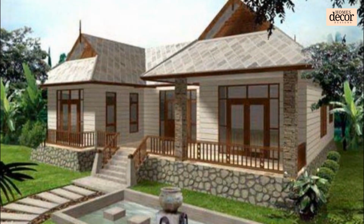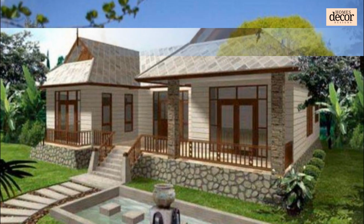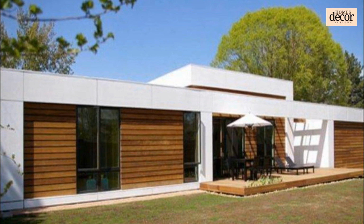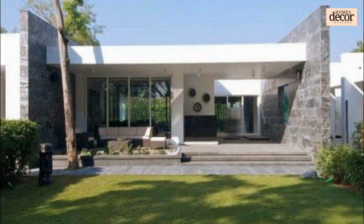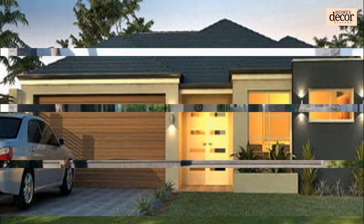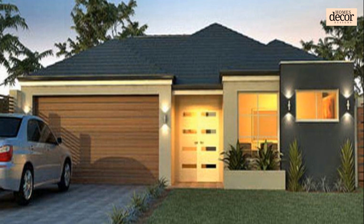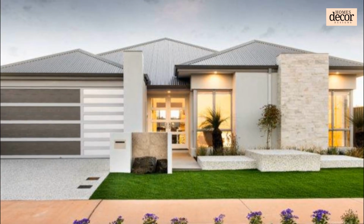Some people find it helpful to hire an architect or general contractor early on in the process in order to help flesh out ideas. With their expertise, small details won't be missed, such as how the addition will affect the lighting in the current space. If windows are taken out, how will natural light be accessed? Skylights are one possibility. A general contractor can also walk you through the permits required for historical sites or heritage homes. They can advise what types of materials should be used.